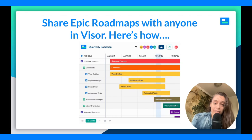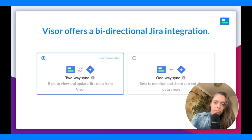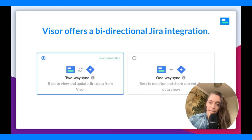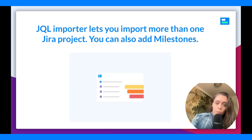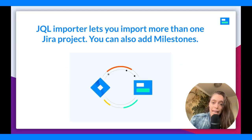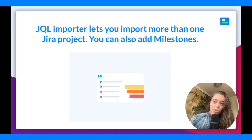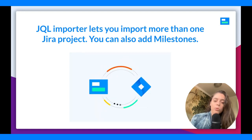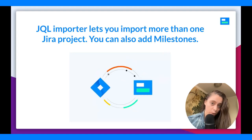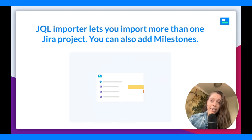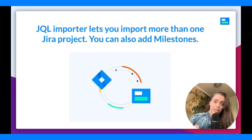You can share Epic Roadmaps with anyone in Visor, even people who don't access Jira, because we offer a bidirectional Jira integration. We have both a two-way sync and a one-way sync with Jira. The one-way sync lets you visualize your data; the two-way sync lets you visualize it and push changes back to Jira. We also have a JQL importer, which lets you import more than one Jira project — crucial when talking about Epic Roadmaps. You can also add milestones, which is not a feature available in either of Jira's built-in roadmap options.